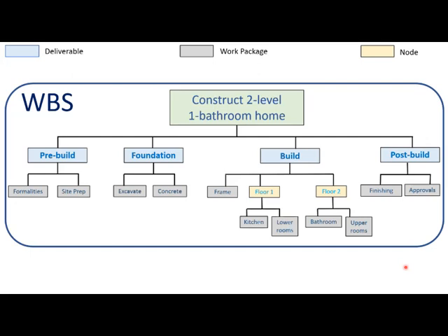Skipping the WBS and jumping right into all the details and minutiae of work is risky and likely to increase the chances of failing to identify some important details. Using a WBS as an intermediate step towards those details and ensuring that the WBS is complete at a high level is likely to lower the odds of failing to identify subsequent details.